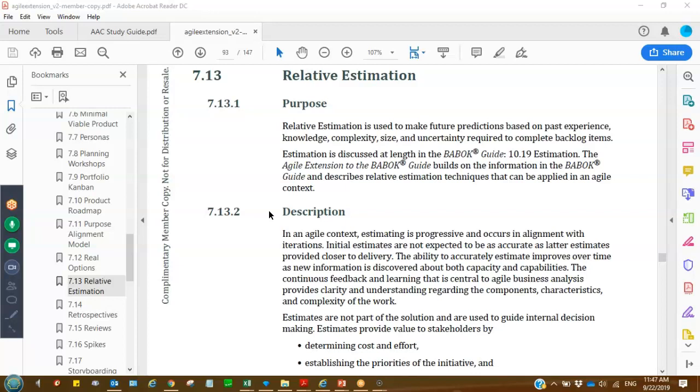And the real danger with that is that people very often try to drive this down into deadlines, try to drive this down into allocations of time and money and resources, when that's not really the purpose of the exercise. The purpose of the exercise is to try and get things into some sort of arrangement so that we understand at a very high level what we're looking at.